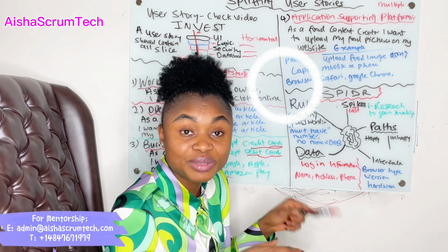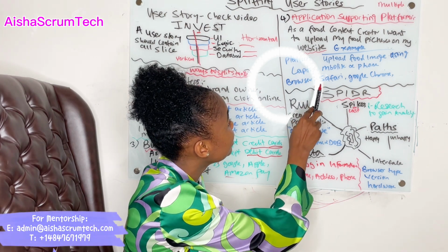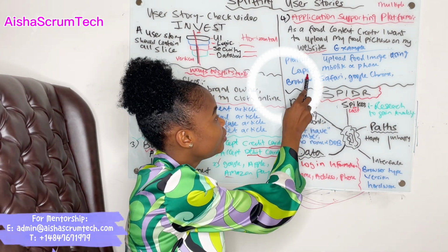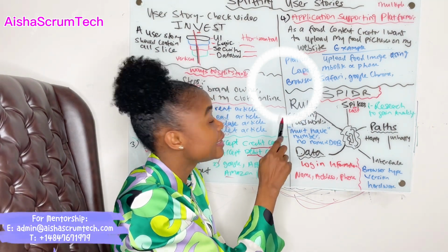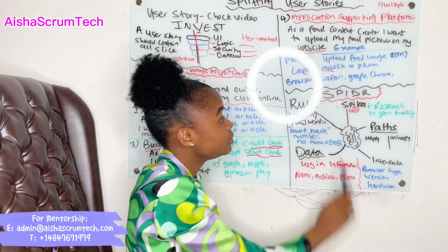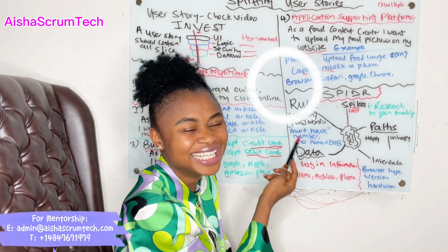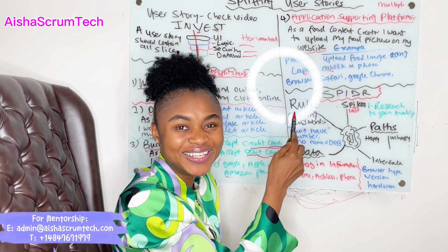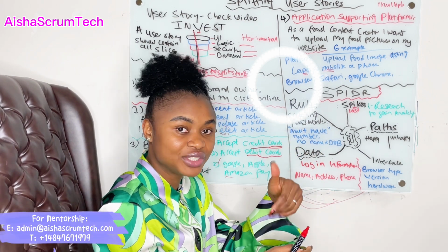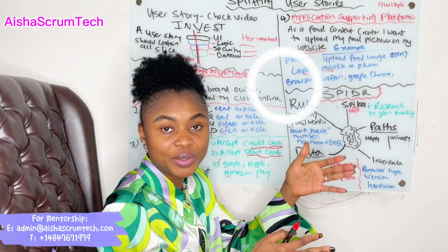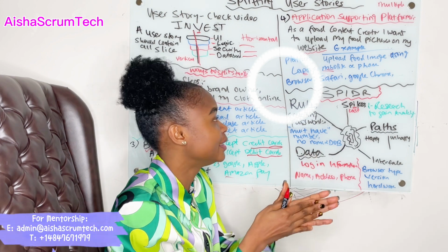So we'll say for this particular sprint, we're gonna focus on uploading images using a laptop, where the customer can view it in a laptop format. They can also view it on their mobile phone. That's the same thing, right? They can view it on their mobile, basically. So focusing on that and splitting, for this sprint maybe we'll have it for people that want to view on the laptop. The next people want to view on mobile and all that.